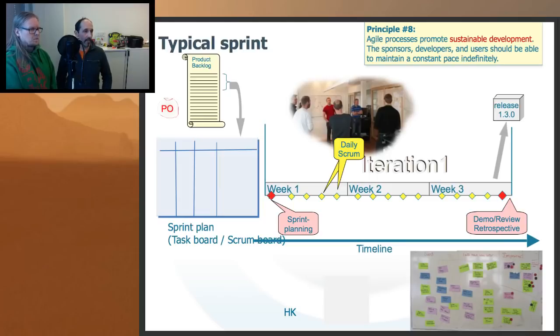So there's discussion, and then also in the sprint planning, technical design gets done to understand how much work there is. And based on these, the team makes the commitment to a certain amount of high priority things from the product backlog. And this is what kicks off a sprint. And then the sprint goes on.